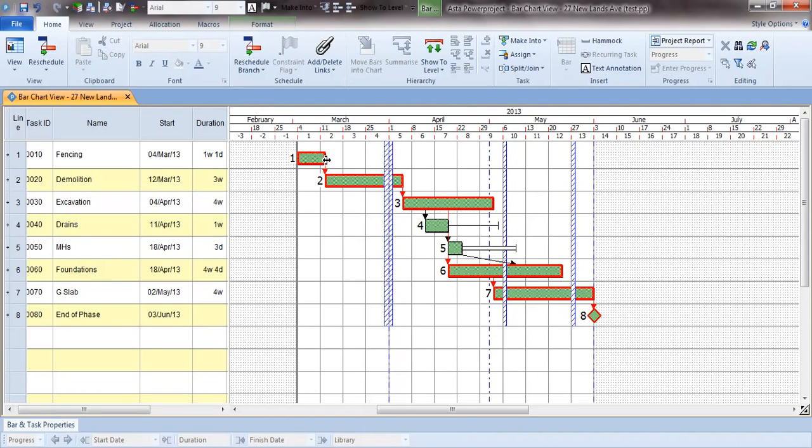So if I made that activity increase by one day and rescheduled, the end of the project is delayed by 1 day. We can undo a schedule, we can undo anything at all in PowerProject without limits, even through a save.